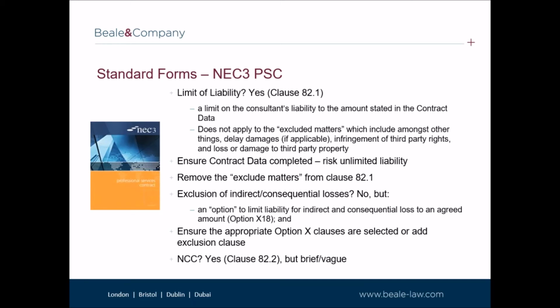The NEC 3 PSC includes provision for a limit of liability in clause 82.1. Clause 82.1 provides that the limit on the consultant's liability is to the amount stated in the contract data. Commonly, consultants do not appreciate the importance of ensuring that the contract data is completed accurately, including ensuring that a cap on liability is included. Given the wording in Clause 82.1, if the contract data does not specify an amount of the cap on liability, then liability will be unlimited. It is therefore very important that the contract data is completed accurately.